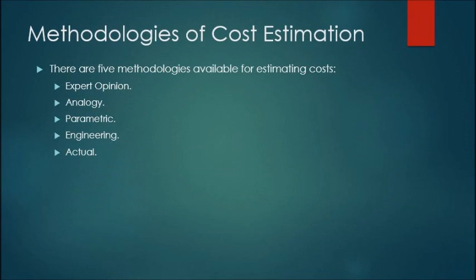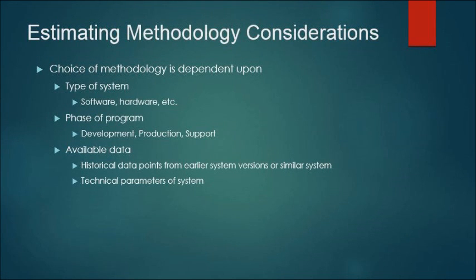There are 5 methodologies available for estimating costs: expert opinion, analogy, parametric, engineering, and actual. Considerations of estimating methodology: choice of methodology is dependent upon type of system, software, hardware, etc. Phase of program: development, production, support.